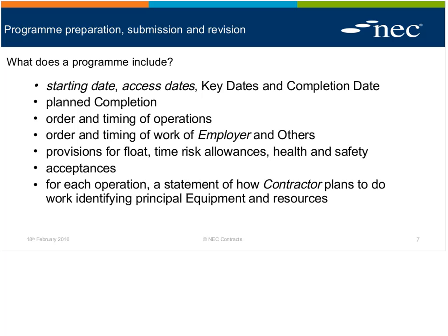And what if you accept it? Is that too tricky? I think I would treat it the same as access. So it's the later of the two. That would be my proposal there. I don't think the contractor can trample over provisions that are fixed in the contract, such as period for reply. So that becomes a fixed period. So you have an inconsistency, perhaps, about when I should reply. I think the program's wrong, albeit I might have accepted it. But I think you have to go by the period for reply. True. So your acceptance doesn't change the obligation to do the acceptance.